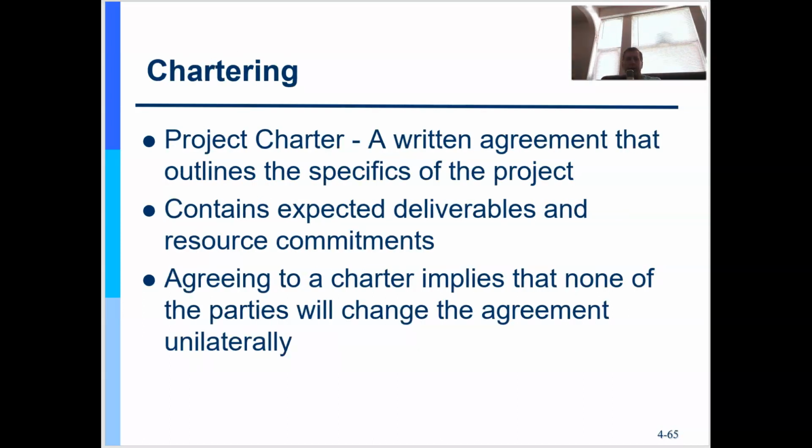Now, chartering, the reason I say that is I like to differentiate from the team charter, which is nice to have and can resolve some of our conflict issues and our understanding. That's very different from our project charter. Our charter is a written agreement that outlines the specifics at a high level. The charter is always high level. Remember, we're going from super high level, the business documents, to the charter, which is high level, but narrowing our mission, to the project plan, which is that focused, detailed approach. The project plan will not deviate from the charter or violate the charter or the business documents above it.